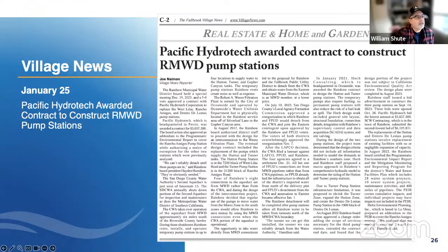And on the award, that's all done. There's nothing else that will happen on that? I know in the past that sometimes there have been wrinkles on some awards, with losing bidders or challenges or anything like that. But we didn't, there was no controversy on this one. It was the low bidder. We didn't get any bid protests. It was all clean. Got it. Thanks.